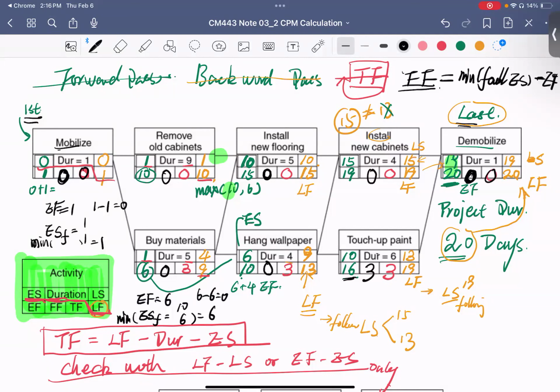So your next early start minus its own early finish. I put it in wrong before, so you got -3. So here should be +3. Okay. So every float, this or this, should be more than 0.